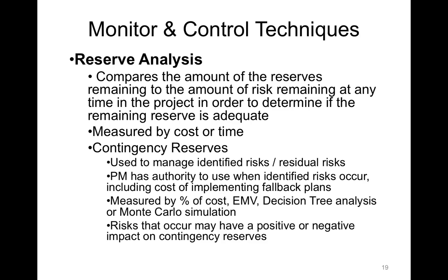So you can determine contingency reserves, and this was already covered earlier on in quantitative risk analysis, using quantitative methods such as the EMV method, or expected monetary value, which also falls in decision tree analysis, or even going as far as Monte Carlo simulation to base your contingency reserve on a confidence interval or confidence level.